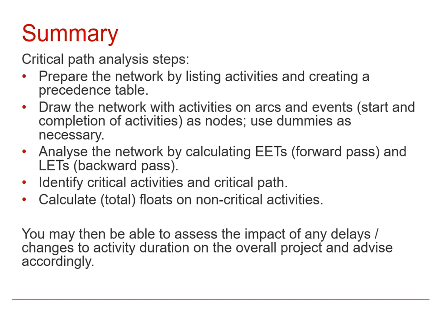Then we go on and do the forward pass and the backward pass, which gives us the earliest event times and latest event times, and from there, as we've just seen in this video, we can identify critical activities which have 0 total float and critical paths.